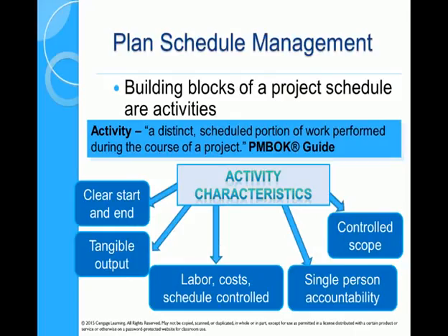So building a schedule, the main component, just like the main component of a work breakdown structure was a work package, the main component of a schedule is the activity. Activities and work packages don't have to be one-to-one. It may be a good idea at this early stage of your project management career that you do make a work package equal an activity.